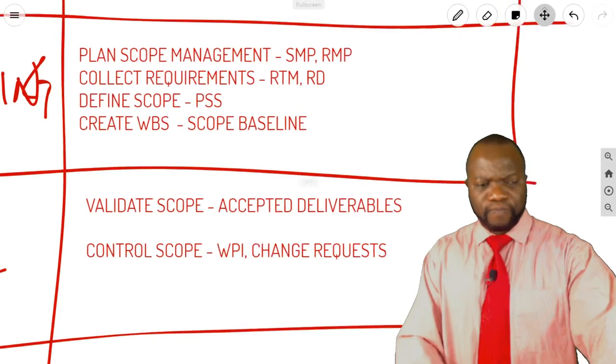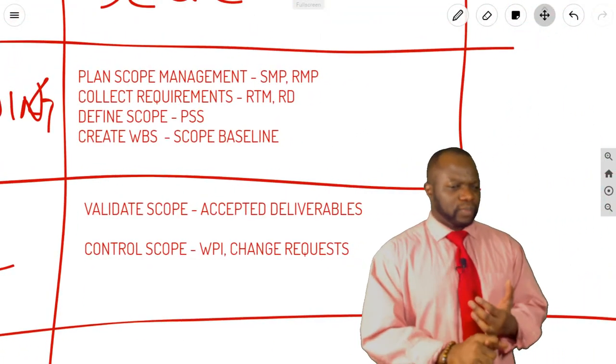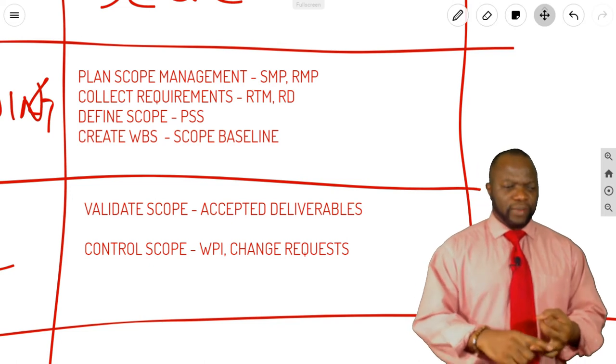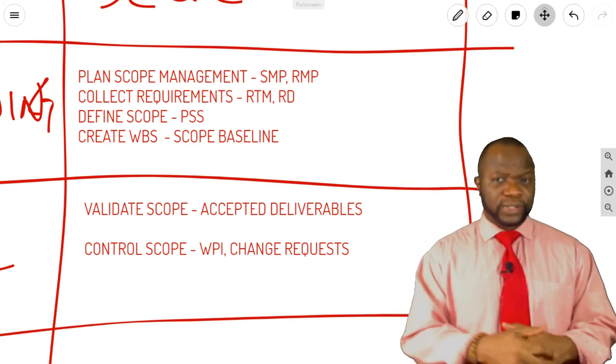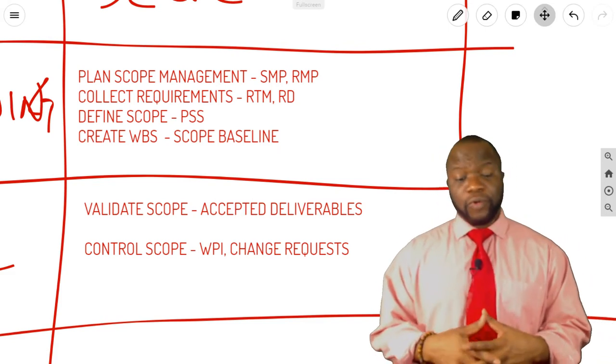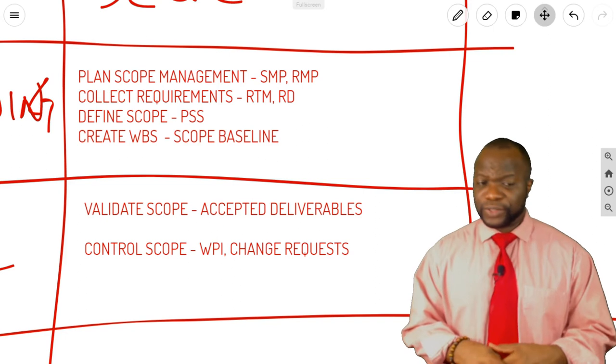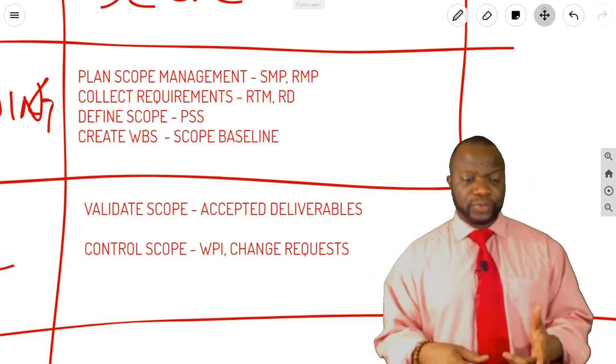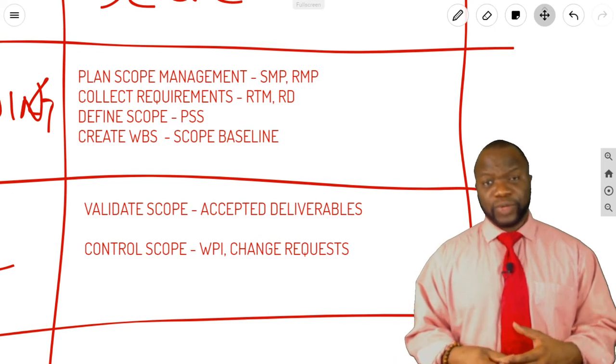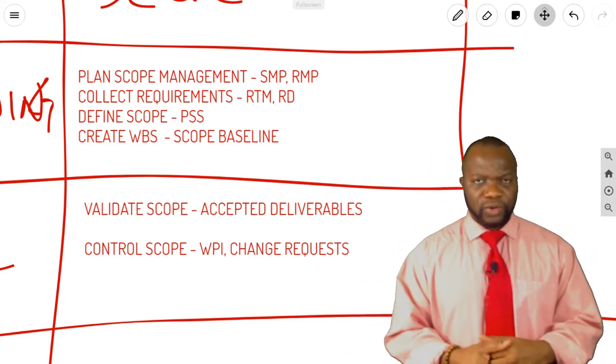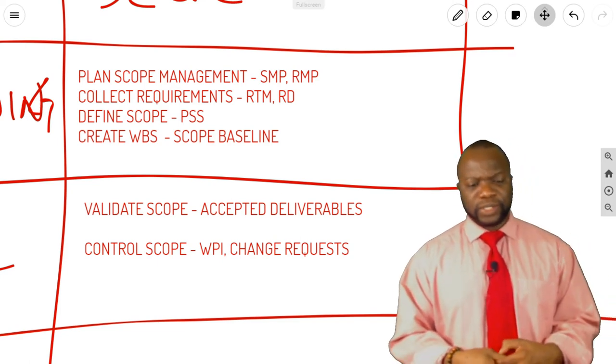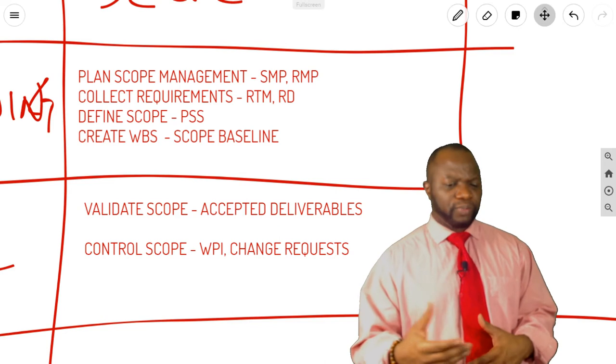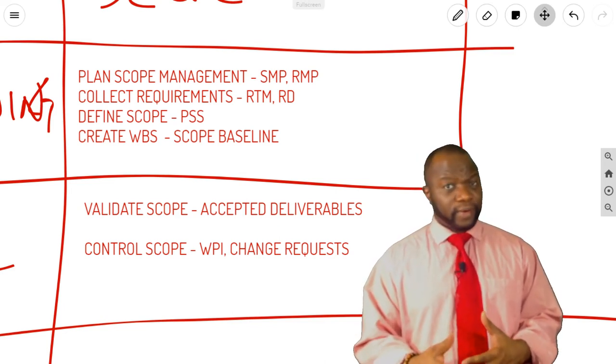Let's make it a lot bigger. Okay. So, you've got Plan Scope Management, Collect Requirements, Define Scope, Create WBS, Validate Scope, Control Scope. The Outputs: the Scope Management Plan, the Requirements Management Plan, Requirements Traceability Matrix, and Requirements Documentation from Collect Requirements. Define Scope, we have the Project Scope Statement. Create WBS, we use Decomposition majorly to do this. We get the Scope Baseline. Validate Scope, we get Accepted Deliverables, and Control Scope, we get WPI. We could also get Change Requests.